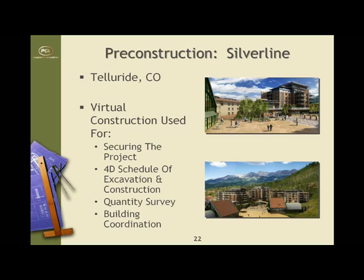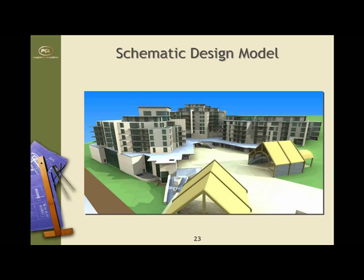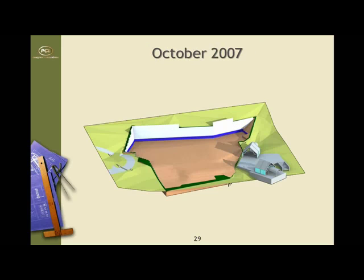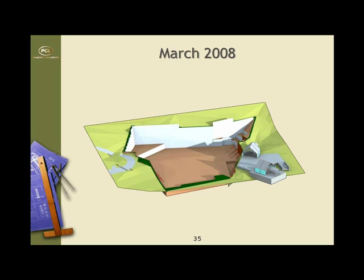Here's another example from our pre-construction phase. We used this again in the pursuit phase, and the big use on this project was the 4D schedule of excavation and construction. Here are some quick renderings of the project. This is actually about a 90-foot hole when it's all said and done — about 170,000 cubic yards — so it's quite an effort to get all the dirt out in an effective and efficient manner. We used this with our shoring subcontractor and our internal team to figure out exactly how we're going to do this.